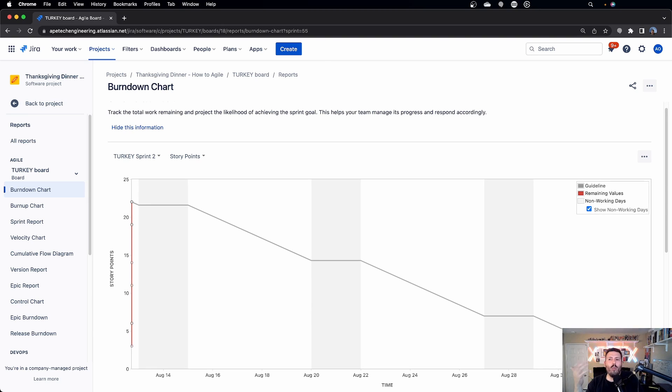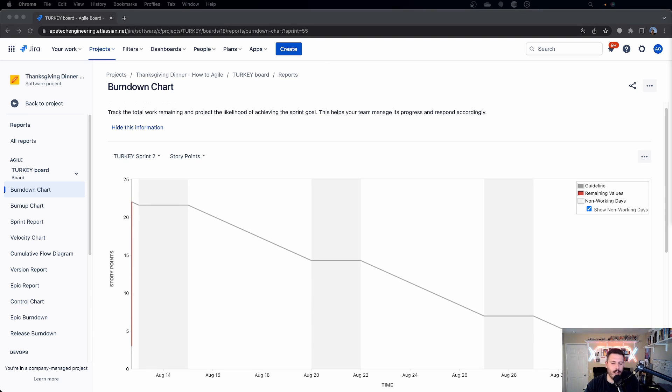I will tell you, I've probably been in 300 sprints by now. That doesn't always happen. That's not always the case. So I'm going to kind of give you some tips and tricks as to how to kind of get better. But just know that that red line is going to start at the top. And hopefully again, double fingers crossed, by the time two weeks later passes, you get down all the way to the bottom or as close as possible. Now, depending on where you've taken some of your actual training, some folks will recommend that shooting for 100% completion is not a feasible goal. I personally recommend that you shoot for 80%. So if you sign up for 100 points, your team should be able to finish at least 80, 85 points on a good sprint. And if your team is under, if your team's like signing up for 100, and they're only knocking out 50, then you have to have a conversation with your team because they're clearly missing that objective.